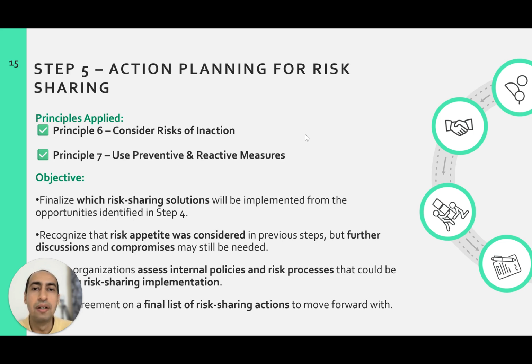The first one, it impacts more than one stakeholder in the delivery chain. The second one, impacting the communities or the service we are trying to deliver to the targeted communities. Then we have categorized those mitigation measures for those suggested risks into 2 sorts of categories. One of them, either they are good or bad practices. The second one is simply preventive or reactive measures.